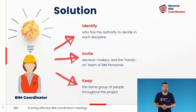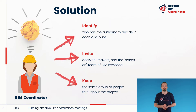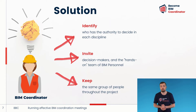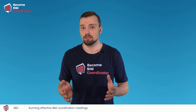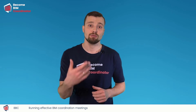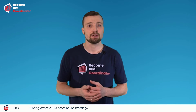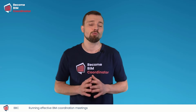For example, if you are in a construction phase, you will probably need the head designer, general contractor, as well as key representatives from subcontractor teams. I recommend also inviting the overall project manager, BIM lead or VDC lead for each trade, as well as the hands-on BIM personnel. Try to keep the same group of people throughout the project. When people are familiar with each other, they make decisions faster and this results in more effective BIM coordination meetings. If there is an individual with only a few specific issues they need to give input on, allow them to leave once their issues have been discussed. If you make an effort to respect people's schedules, you will see it always pays off.